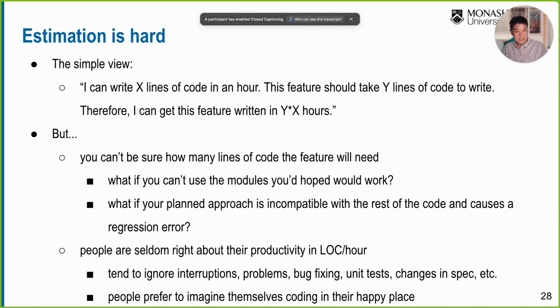They just multiply by the speed and then get the hours. But it's not really accurate, because lines of code depend on other factors as well. Does it only cover the implementation, or the unit tests and other things as well? What if the specification changes? Think about the UI: HTML, CSS. There are so many technical parts involved in lines of code. So it is really hard.